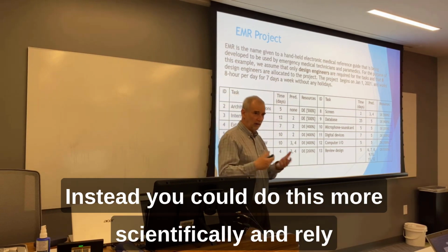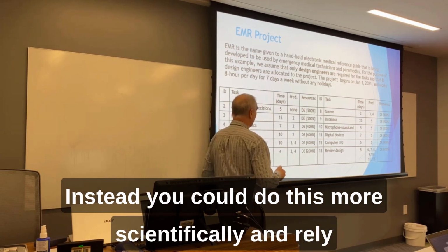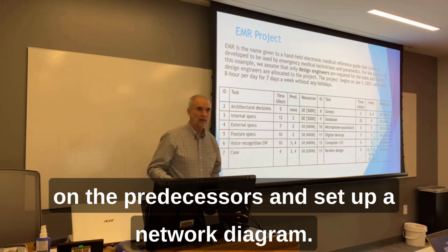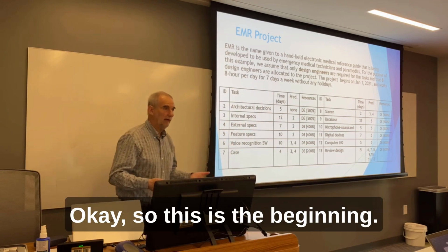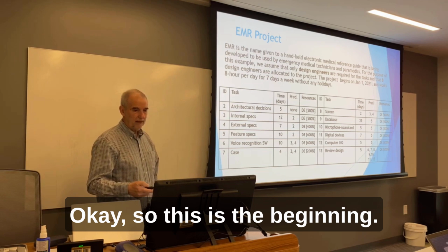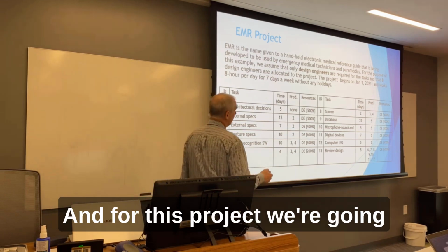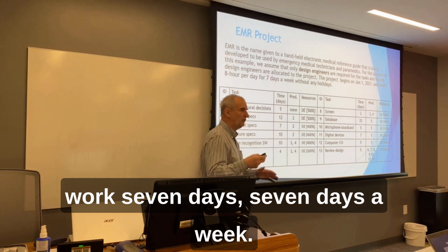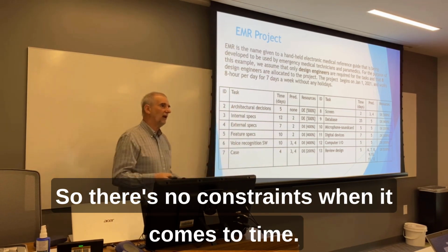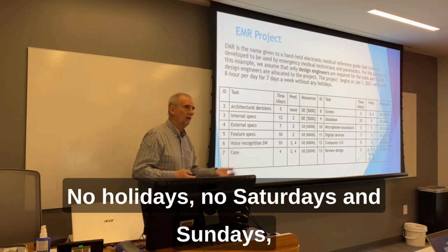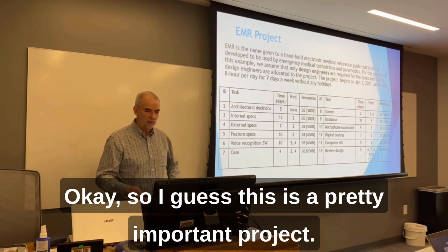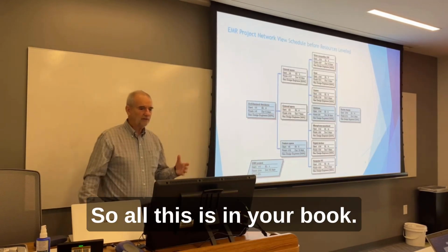Instead, you could do this more scientifically and rely on the predecessors and set up a network diagram. You following me on this? Okay? So this is the beginning. And for this project, we're going to start on January 1st, 2021. And to make it easy, they can work 7 days a week. So there's no constraints when it comes to time. No holidays, no Saturdays and Sundays. They work 7 days a week. Okay? So I guess this is a pretty important project. So all this is in your book.